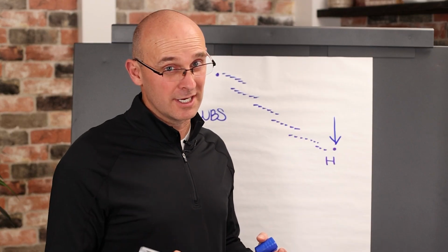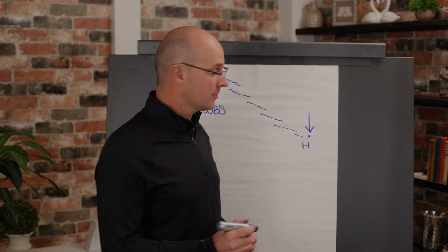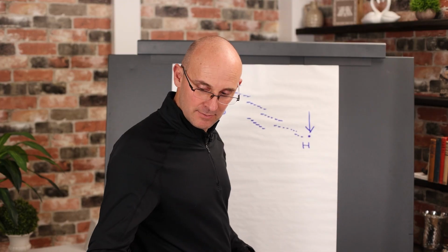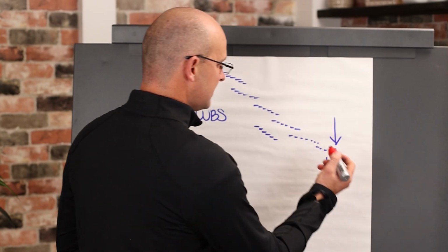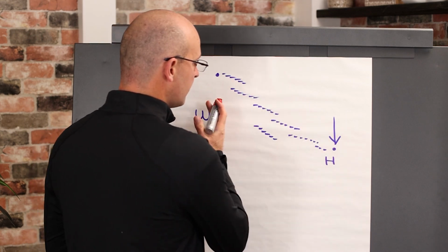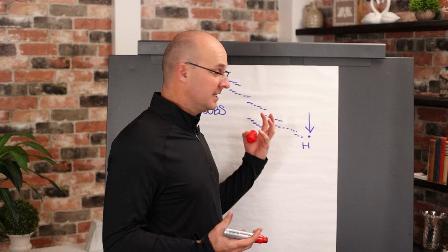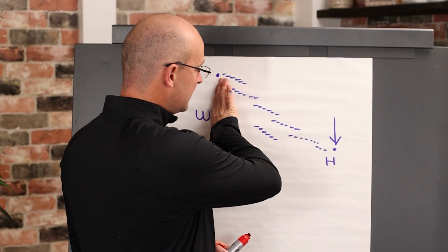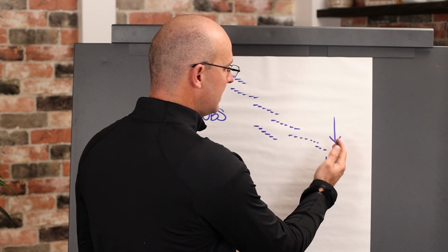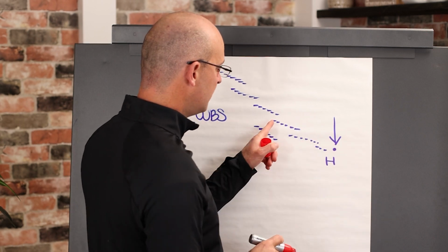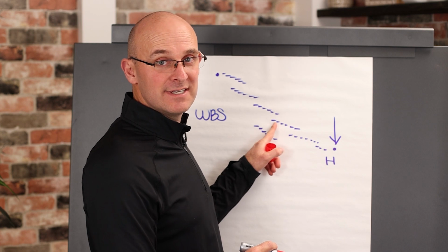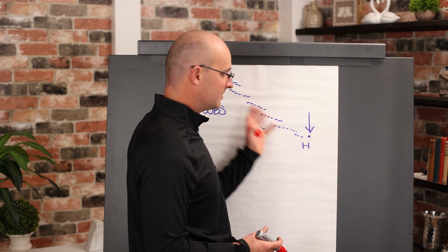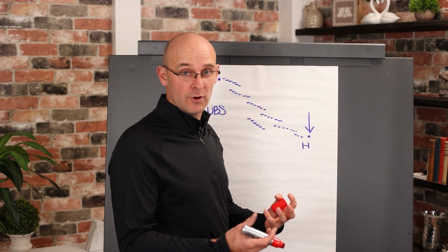Now, this is what we're going to cover next. There's something in construction called a critical path. And these critical paths, let me get my red marker over here. It does a forward and a backward pass. I'm not going to explain the algorithm in this video, but it goes through a mathematical algorithm, and it basically calculates up into the end date and back and shows how much float each of these activities has as free float, or how much float these activities might have as a sequence for total project float or project float.